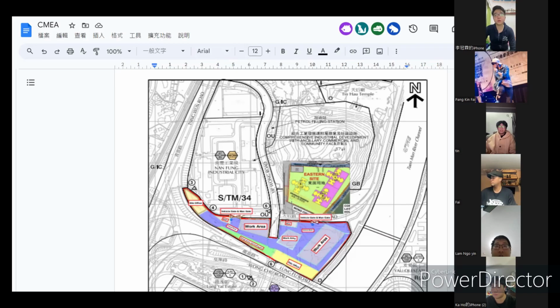The steel bending yard for operation synergies is adjacent to the storage area. By centralizing this operation, we have significantly reduced the transport distance for steel reinforcement, thereby optimizing the transition from preparation to use and improving productivity.